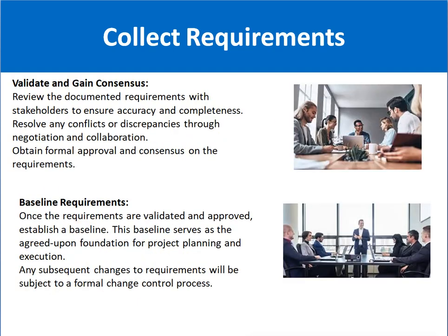Next is validating and gaining sign-off. Whatever information you have received, validate it with the stakeholders to ensure accuracy and completeness. If there are any problems, issues, conflicts, or discrepancies, you have to talk with the stakeholders and try to resolve them.